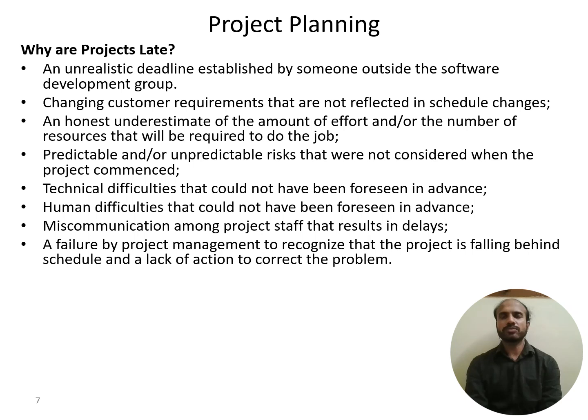So when the customer comes and requests from time to time about any changing requirements, then obviously it's going to delay the delivery of the product. An honest underestimate of the amount of effort and/or the number of resources that will be required to do the job. So if the effort was not properly estimated, then again you will not be able to deliver the product, because you have very limited resources and you're not able to deliver what was asked for.